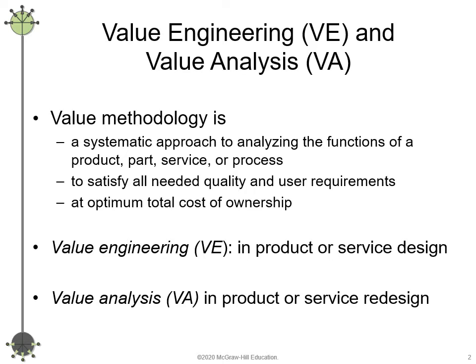In this technique, we want to review the different functionalities or functions of a product or a process. After we identify different functionalities, we need to evaluate the cost of them. For each function of this product, how much money are we spending? Does it work? Is there any way that we can manage the costs? Is there any way that we can reduce the cost for each of these functions? Is it worth that we spend so much money for this function? So this is the way that we use value engineering.